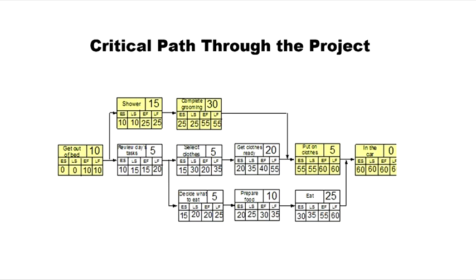For example, shower could start as early as minute 10, has to start at minute 10. Could be done as early as minute 25, has to be done by minute 25. There's no extra room in any of those tasks.